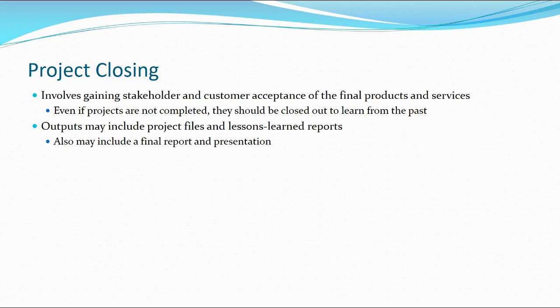It also comes down, at some point, you've got to close the project as well. And how do you close a project? Well, you would also want to make sure that you would actually accomplish and satisfy the need. Are the customer or the stakeholders willing to sign off and say, yes, you accomplished the task, or no, you did not? The outputs could be, in addition to project closure documents, you may want to have some sort of lessons learned. What did we do right? What did we do wrong? What should we change if we do this again? You're contributing to your organization's overall knowledge base, and you might even include a final report and presentation on this as well to be able to say, hey, look, this is what we learned. Why lose that valuable information that you spent so much time creating?